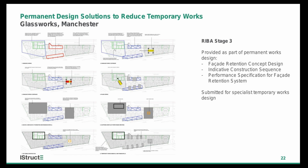It wasn't possible to move the piling rig from A through the site to Zone C, given the tightly packed nature of the temporary works, and also the level difference. There's about a 2 metre level difference between the Block A end of the site and Block C. So it was quite difficult to track the rig across that area. So there were almost 2 separate piling operations happening at each end of the building. And in order to pile the central element of the site, it would have needed a special access piling rig, which was driving up costs and complexity as well.